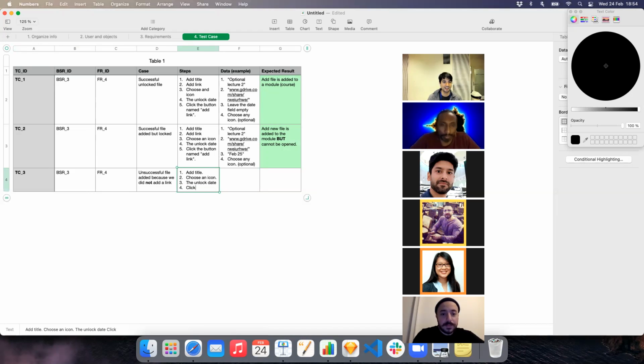Then we can also add a broken link. What? Can we add a broken link, like a link which doesn't work? Beautiful question. Congratulations. Right now the system doesn't validate that. But if you are working, for example, with a bank or something that requires super specific, strict control, then we can add a specific case that validates if the link is a valid URL or not.